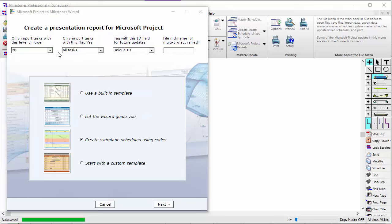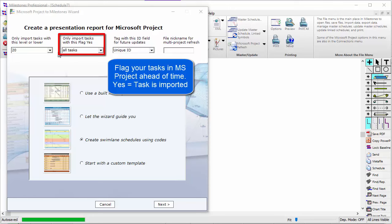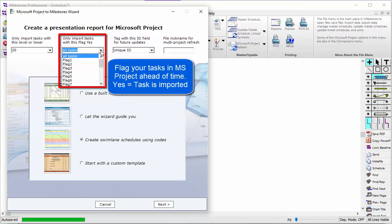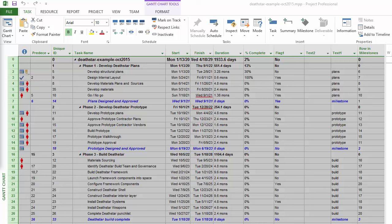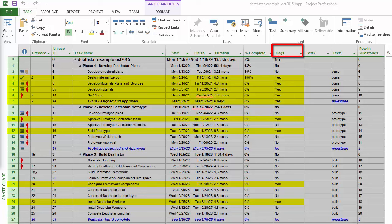Next is the Flag Field drop-down. This is the most common way that users tell Milestones which tasks to import. You would add a flag field to Project and then set tasks to yes if you'd like to import that task. For instance, flag 1 has been added and some of the tasks are set to yes, meaning Milestones would only bring in those tasks if you choose flag 1 in that drop-down.